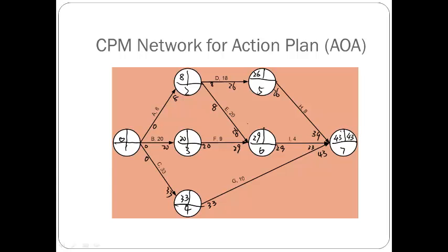And then you go backward. So the latest finish time becomes 43 here, and 43 subtract 8, you got 35. And for this event, it's also 43. 43 subtract 4, 39. Okay, and 43, 33 here. And you keep going. 39 becomes here because that's the late finish time.